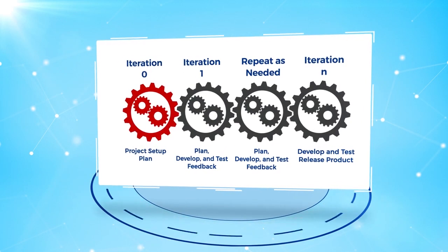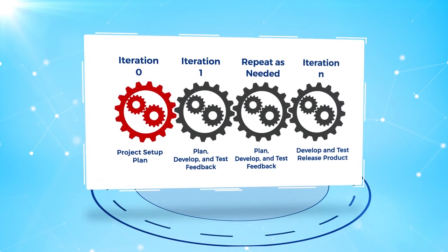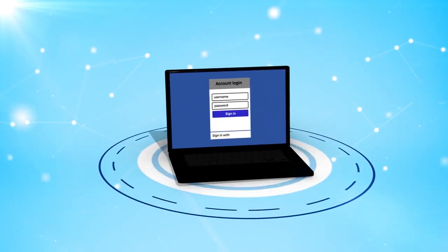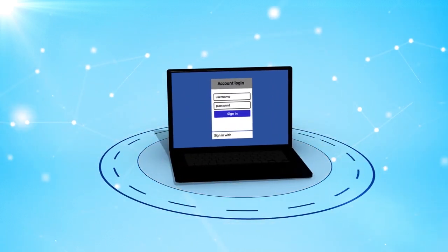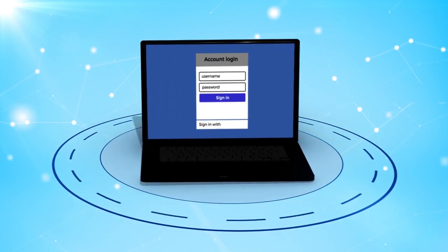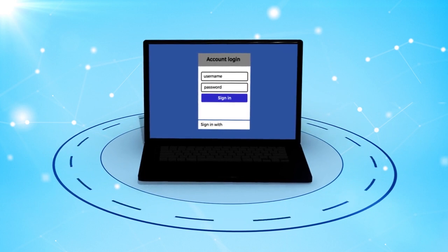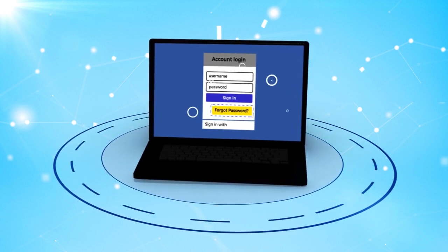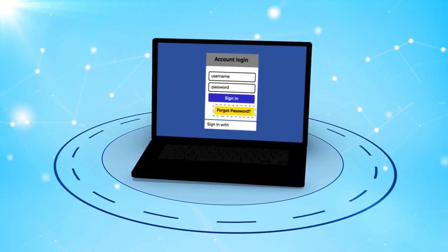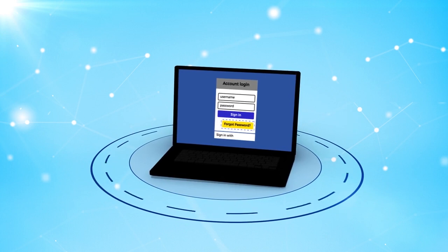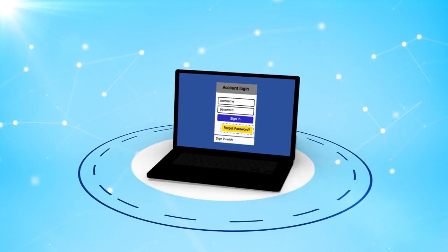So not only are you building the pieces of your final product incrementally over time, you're also iterating, meaning in the first increment, you might initially build the minimum features that are required for your product, such as login functionality. Then, once you've tested that functionality, in the next increment of work, you may build more robustness into that feature. So you're incrementally adding different features to your end product and adding robustness to your features with each iteration.